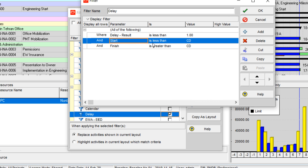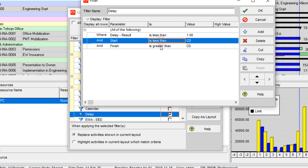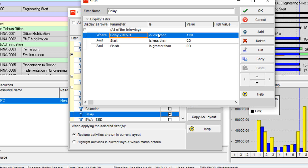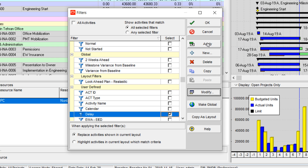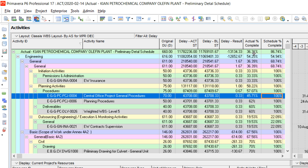The filter condition is: if the start of an activity is less than the current date and the finish of the activity is greater than the current date. We mention both of them because some activities are already finished and done, so I don't want to present them in this filter. The delay result is less than negative one — meaning our minimum delay threshold — and you can adjust this. You can find these activities that have a delay.